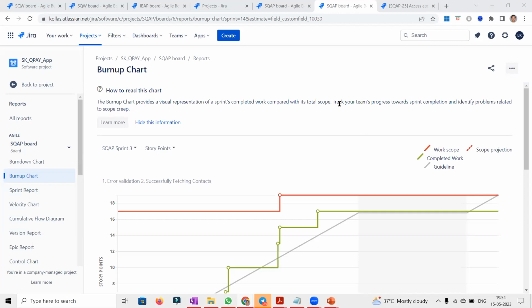Right, so why I'm asking the question is, in the Burndown chart, Satish, we can have that Burndown chart with original estimate as well instead of story points. I think these things will get reflected, right? Exactly. But if we change the original estimate, the Burndown chart won't consider that. You need to remember that. The original estimate, whatever is there when the sprint starts or before the sprint start, only that will reflect in the original estimate of the Burndown chart. Even if you change it in the middle, it won't show in the Burndown chart.